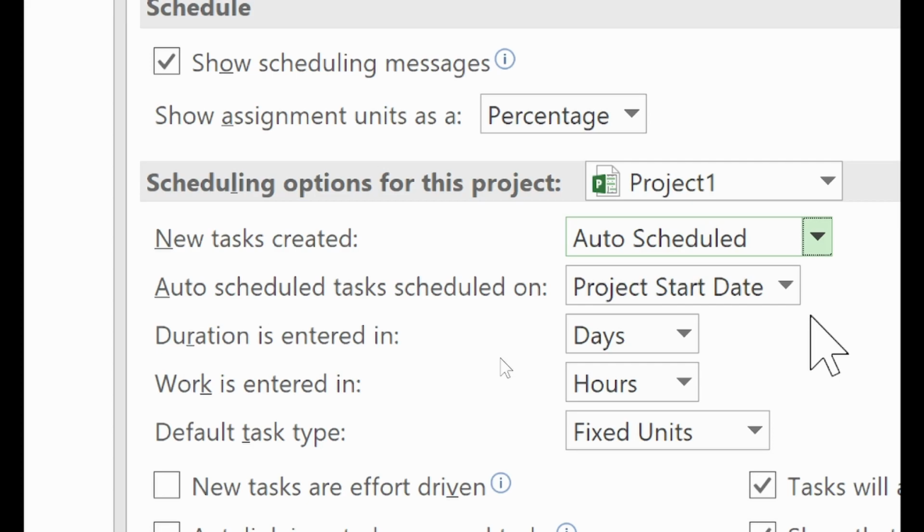sometimes things change. If you are working with a manual setting, and let's say one particular task we allocated 2 days, but we realize that it's going to take 4 days, when we change it in the system, if it's under auto, it will readjust the entire project timeline, because the time for one particular task has changed.